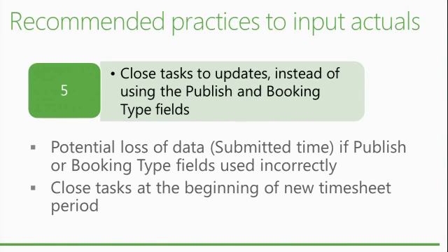Yeah, but inactivating does other things. Schedule impact, yes. Inactivating does additional things besides just closing the task, because it impacts the schedule and the assignments and everything. Not the predecessor-successor relationships, it just won't let you update it any further if you just close it.